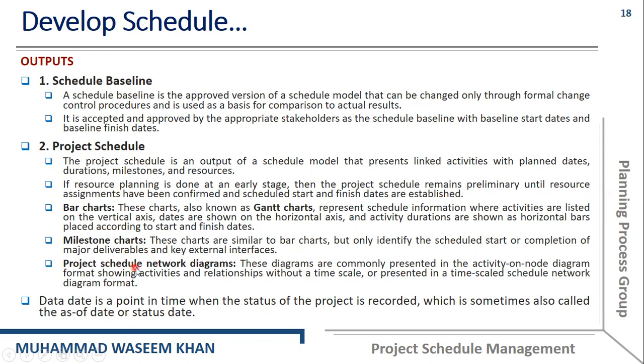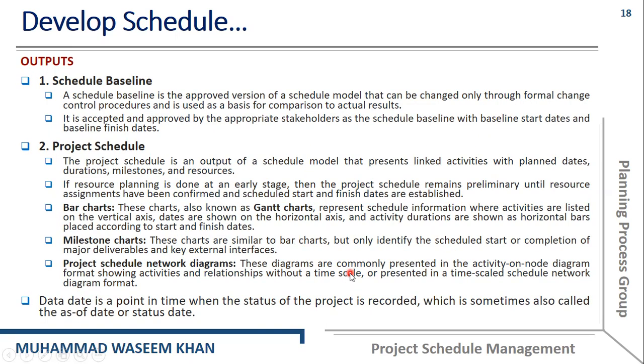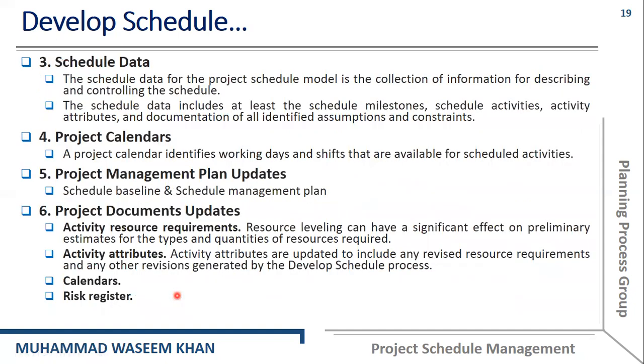And then the project schedule network diagram. These diagrams are commonly presented in activity-on-node diagram format, showing activities and relationships without a time scale, or presented in a time-scaled schedule network diagram format. So these are something that we will achieve at the end of developing the schedule model.